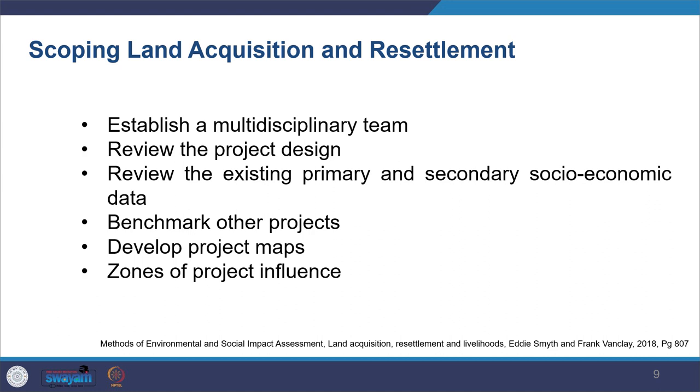And further, at this stage, you might also look at other projects, so benchmark projects. Looking at the other projects is going to help you understand what other issues might happen and which you might have to deal with in your particular context, and what kind of compensation has to be given for that. You've already seen in the Indian context how we have a very defined formula-based compensation, which is already in place. So all that benchmarking of the other projects would help you to identify that.